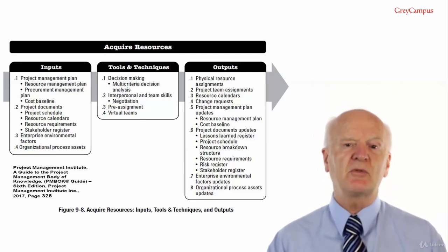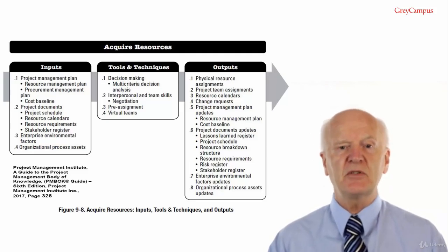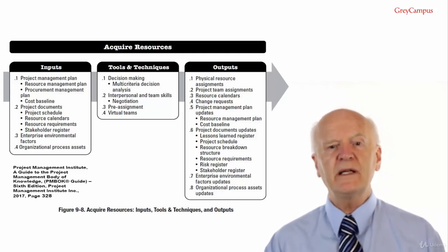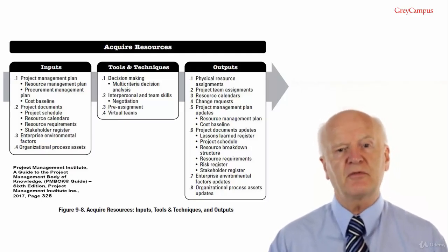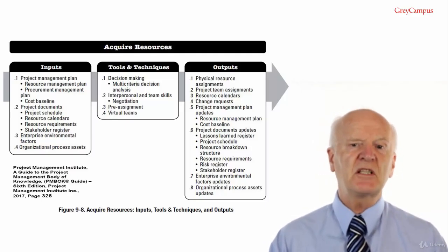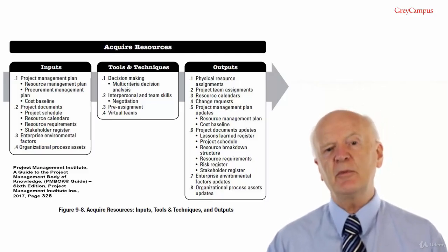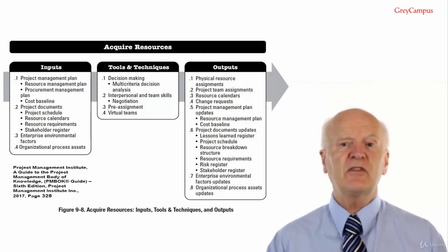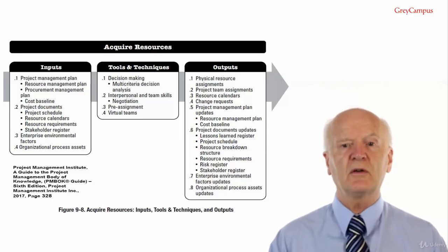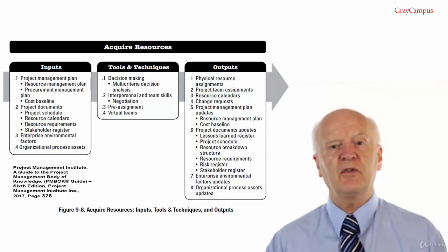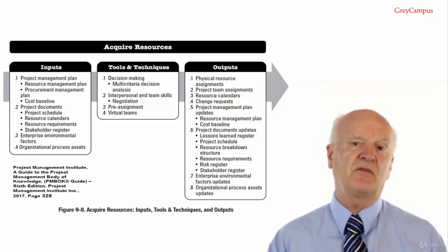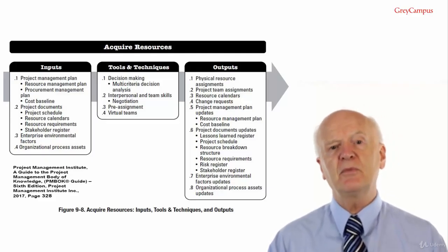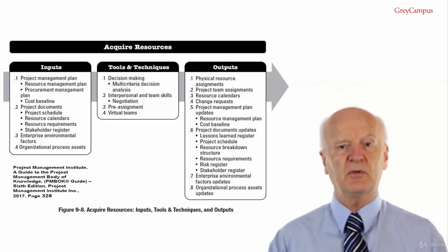For example, choosing between internal and external team resources. The criteria are weighted according to their relative importance and values can be changed for different types of resources. Some examples of selection criteria that can be used are availability, to verify that the resource is available to work on the project within the time period needed. Cost, verify the cost of adding the resource is within the prescribed budget. Ability, verify the team member provides the capability needed on the project.